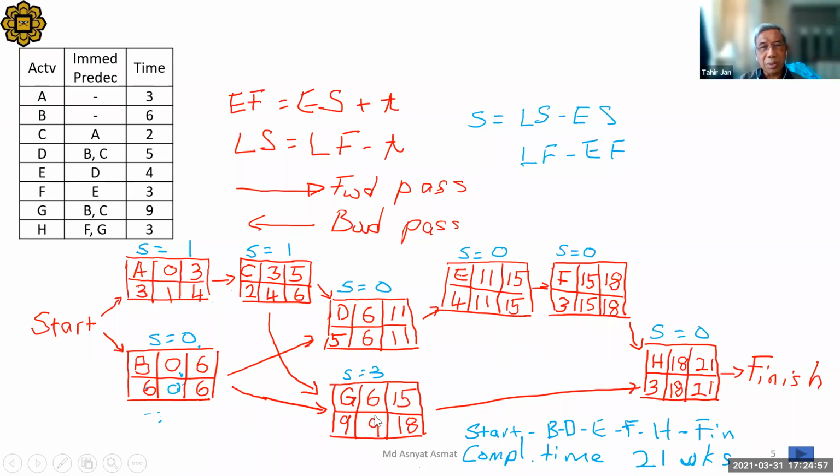Sometimes, especially in construction, if every team is working in one place, it is so crowded that we have to delay certain activities so that it is less crowded, and the financial resources are also more spread. If you can delay, you can delay. Sometimes it's by choice. If we know we have some slack, we delay it. Otherwise, we will not.